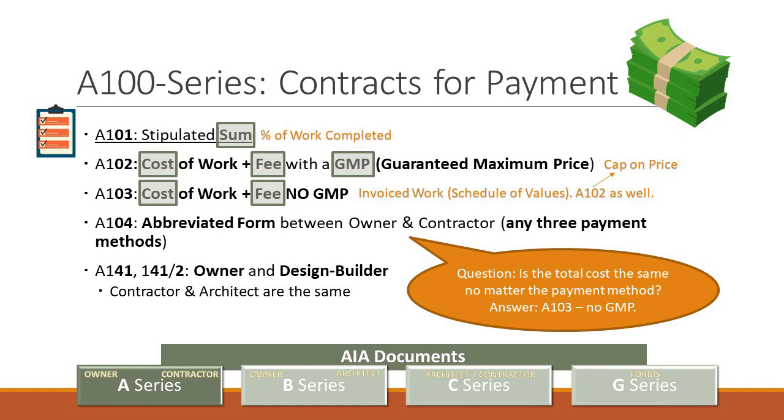Last point on this, and why that analysis is important. Contractors, and it's not for a nefarious reason, although there are good and bad contractors everywhere, will often tend to accelerate their percentages early on in the project because they're spending lots of money buying materials and equipment.